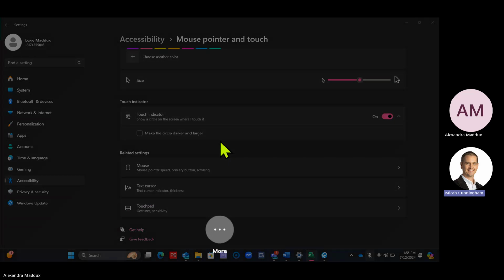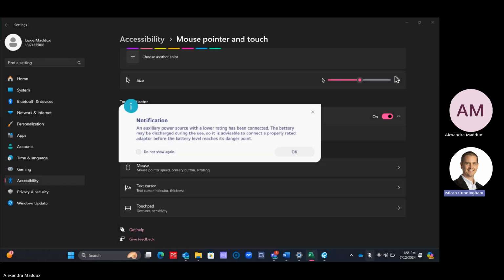So say you had the form slab for 4 days, and then you had the rebar slab as a finish to start -3. Oh, I did an equal sign. Okay, so this is the same date because it's equivalent to a relationship of a start to start plus 1. Zoom in on here. So I still have the rebar slab. You can see the arrows now going backwards instead of forwards because it's now a negative lag.